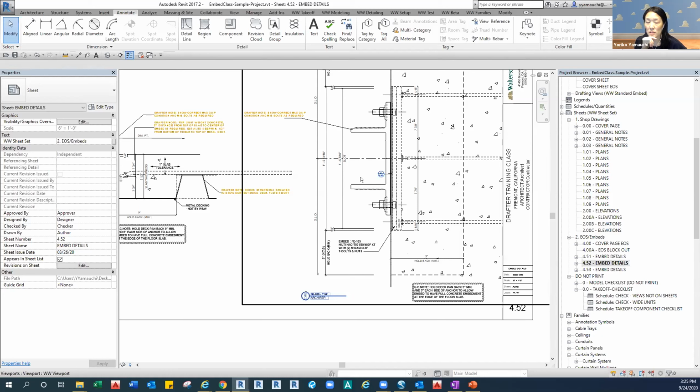I love it. I think the only time where maybe a detail showing the mat clip would suffice is in some cases where the mat clip isn't aligning exactly with the embed. Sometimes at corners where some embeds are so crammed close together, and then we've got pony tubes in there, and they're slightly offset. That's probably the time that we might be showing mat clips. That way we can see where that dim point is really going to in that detail.